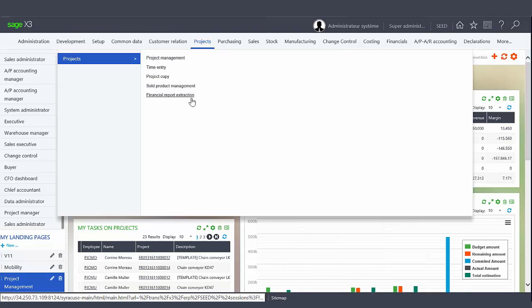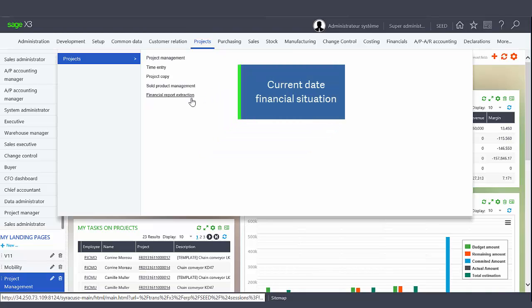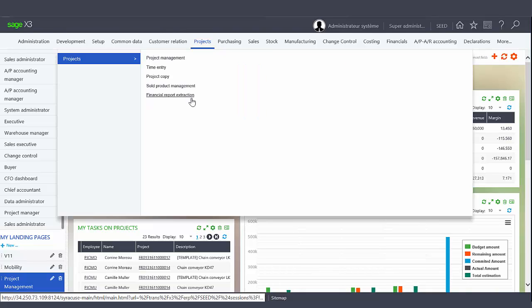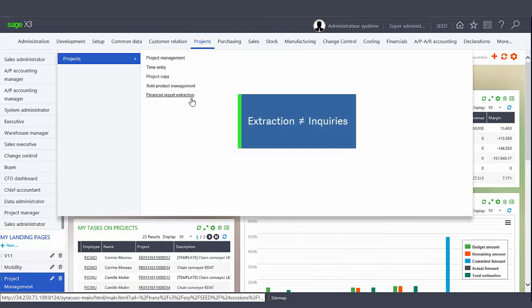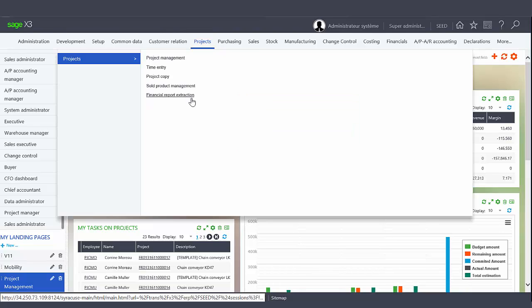The Financial Report Extraction function allows you to extract the financial situation of the project at the current date. The extraction will be a snapshot of the project situation at the given time compared to the inquiries available in the Project Management function that are based on the real-time situation. This is useful to compare the evolution of a project over time.